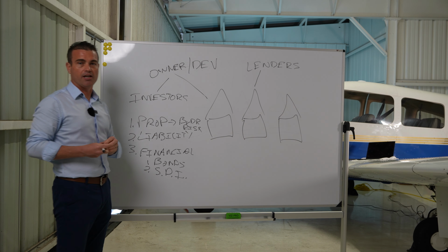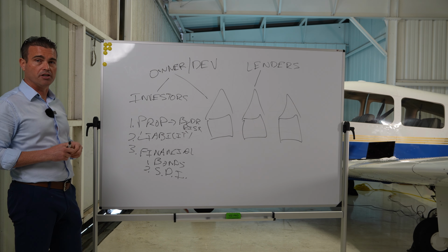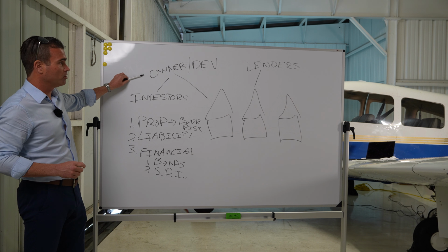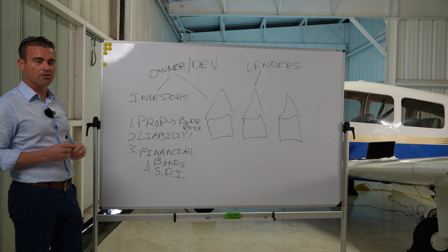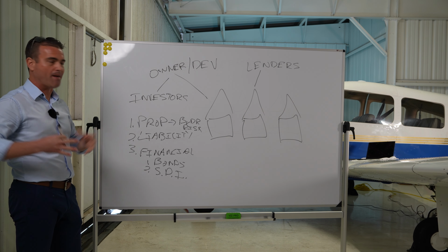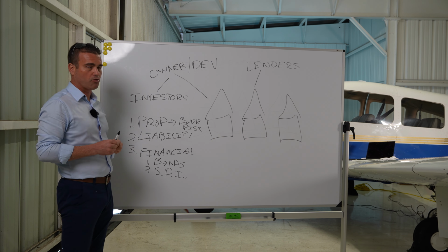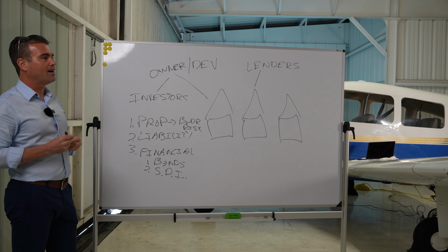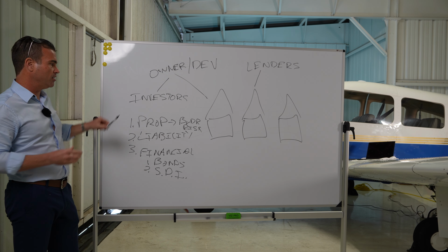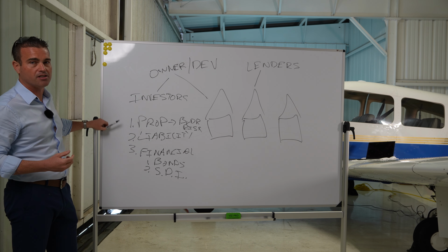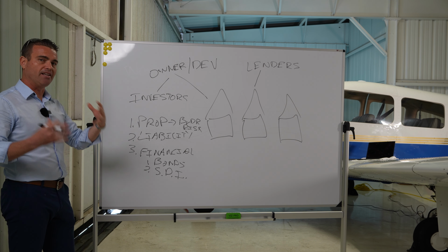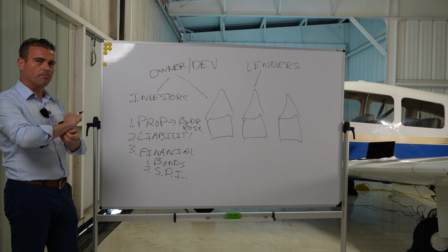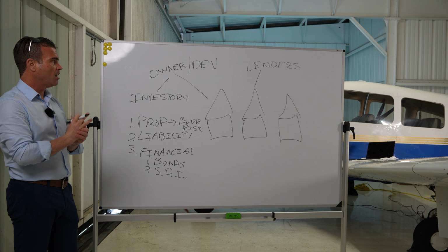involved in, is we can introduce something called an OCIP, or an owner-controlled insurance program. That's going to provide direct protection to our owner-developer, and it's actually very good for the lenders too, because you have one insurance program that's a master insurance program for this one project. So there's less identification and research into the GC's insurance and every single sub's insurance and every single subcontract agreement, right? So that protects a blanket coverage, and we'll talk more about that technically some other time, but on most